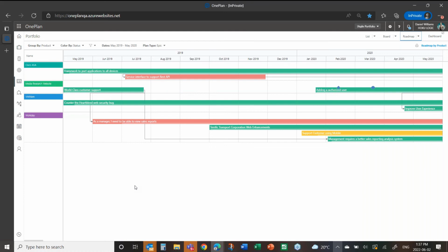So lots of different visualizations and the ability to define a program increment and manage the backlog, move data into each program increment, set budgets and other thresholds on those particular program increments to make sure that we are planning and we're constantly driving towards the realization of value. We're addressing change and the need for agility constantly as we go.